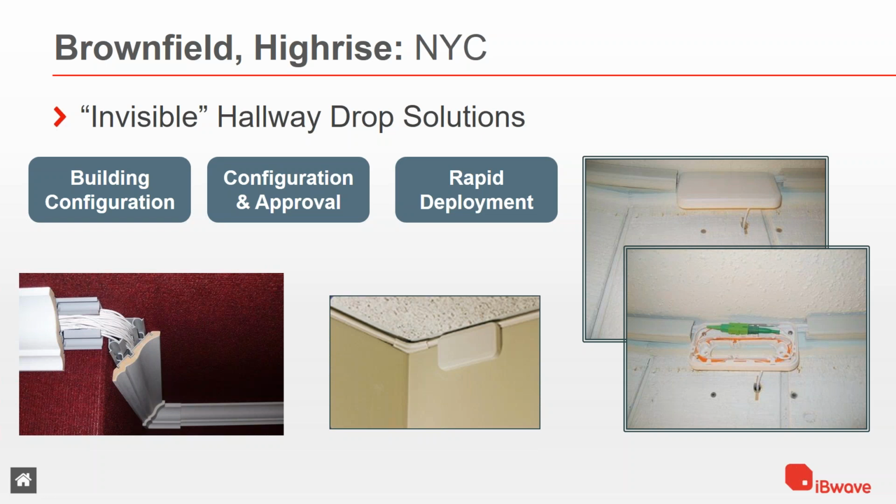As you can see, with every right angle, every nook and cranny, there's different attachment hardware, different clips required. So understanding the floor layout, the building configuration is critical, and then getting approval from the building owner for the impact is important. Additionally, to minimize the impact to the tenants, a rapid deploy solution is important as well.